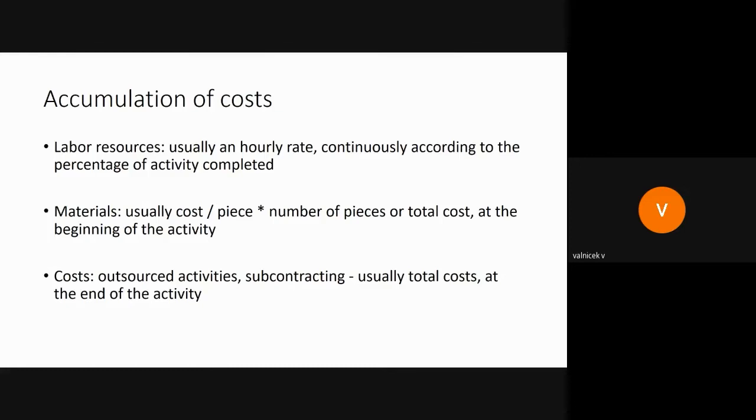So if you encounter any project where you can decide if you are going to use the full cost model or the flat rate model, my advice is always go with the flat rate model because it's way simpler and way safer, even in terms of later controls.